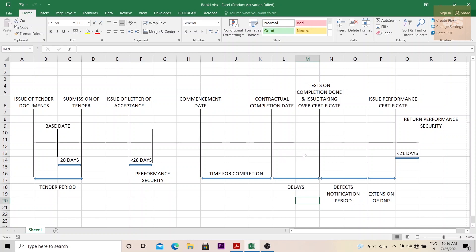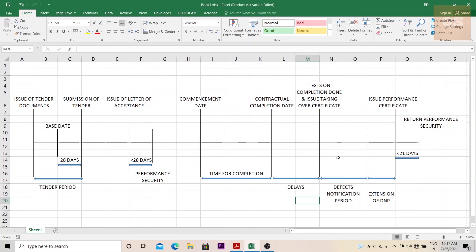Once after the delays, finally, the project is completed. And finally, the tests on completion is carried out. Once that is successfully completed, a taking over certificate is issued to the contractor by the employer. In this taking over certificate, the employer can mention regarding some completion of works, there might be some works that need completion, there might be some rectifications needed. So all these are noted down and need to be completed during this defect notification period.